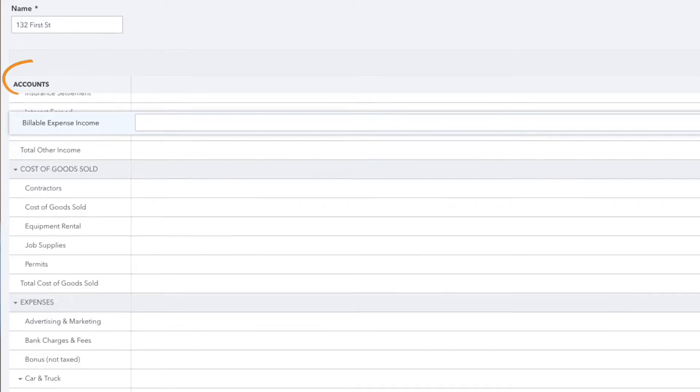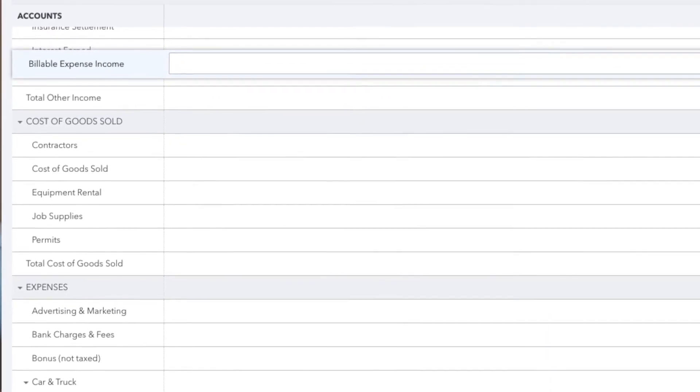Unfortunately, QuickBooks Online doesn't have budget versus actual reports on its own. The workaround is creating accounts named after your cost codes — though this makes the profit and loss statement very large unless you minimize some parent accounts. After you create those accounts and connect your products and services to them, go to Settings > Budget, set up the yearly budget, and you'll still be able to track actual expenses inside the Projects feature. Then go to Reports, pull up the budget versus actual report, and see where you stand numbers-wise.